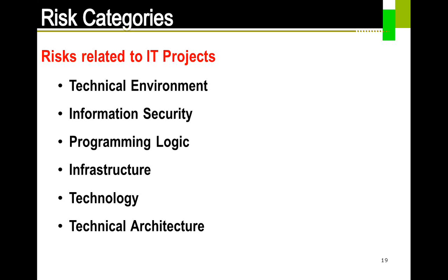If you take a typical organization, you will find they have many databases, something like Oracle, SQL Server, DB2, IMSDB, and when it comes to programming languages, COBOL, Java, C, C++, and .NET, all this. So I always wondered why an organization would look at so many languages. Why can't everybody use COBOL and DB2? Later on I realized that dependence on one single language is a real threat to the organization, because let's say tomorrow whoever is supporting COBOL or DB2 says that their organization is getting closed and they are not going to do any more development in that particular language or database. Then the organization has to really suffer.